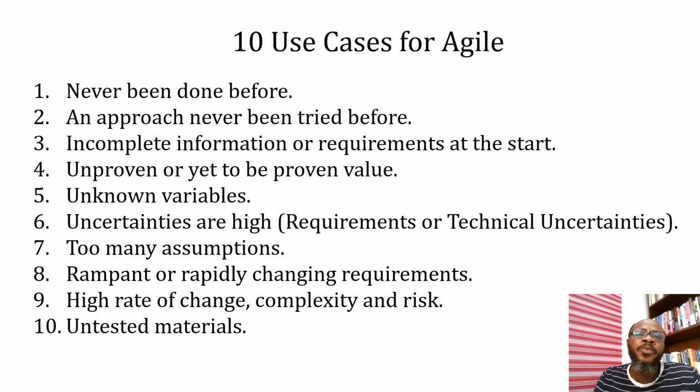So for minimum viable product, what we do is that we create a minimum version of our product idea and test it in the market in order to gauge the interest of our target users. If it's a green light, then we keep upgrading the product based on the feedback from the marketplace, based on the feedback from our customers, all right? So it's actually an empirical procedure in order to evolve it to the way they want it. But usually we don't have all that information from the start. We need to give them something to engage their interest, and then the rest follows after that.